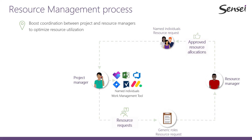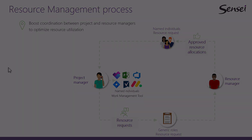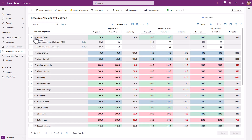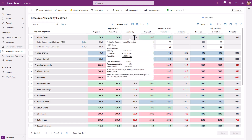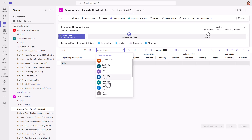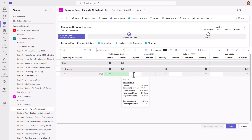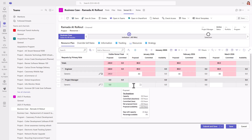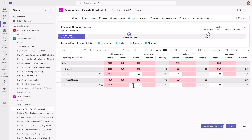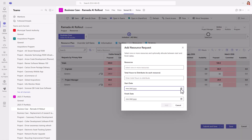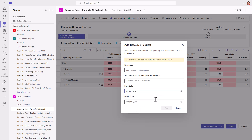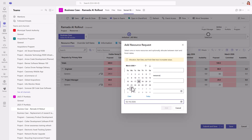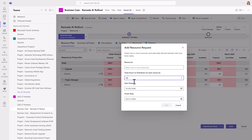There are many variations of this process, but the outcome is always resource availability. In the example here, Amy has been allocated to work 80 hours this month on the first project and 50 hours on the second, leaving her with 38 hours of remaining availability. The full resource plan is typically built at the beginning of a project in the planning phase by requesting a certain amount of hours, but it can also be percentage or FTE requests. It's also not uncommon to request additional resources during project execution, which is why it's important to have a regular review process to assess allocations.